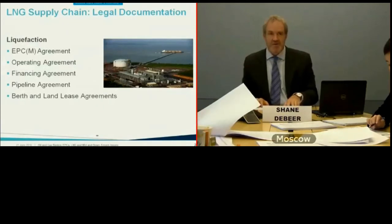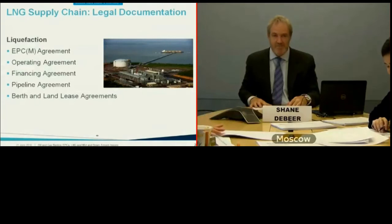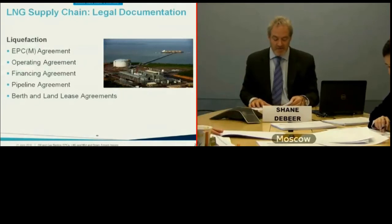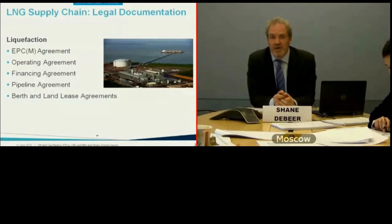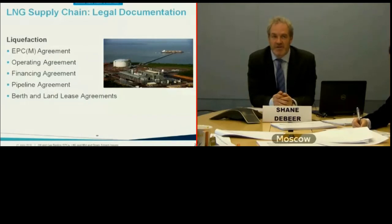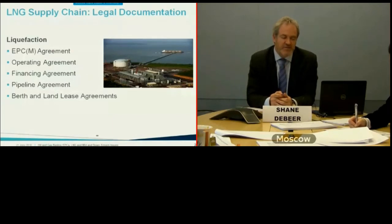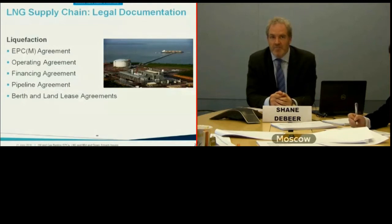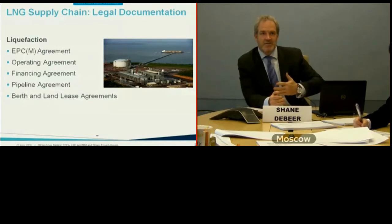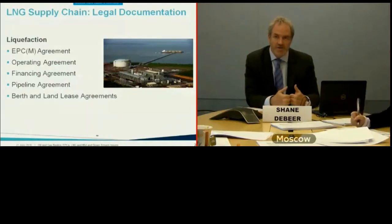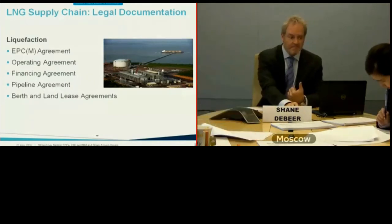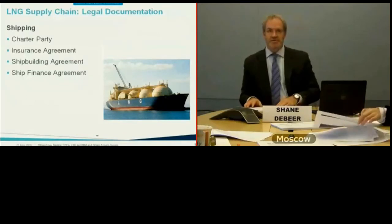For the liquefaction plant, in addition to the EPC contract, there will be an operating agreement with a designated operator — there are specialty companies that operate LNG liquefaction plants — a financing agreement typically in project finance form, a pipeline agreement to move gas from upstream into the liquefaction plant, and berth and land lease agreements for the port infrastructure required to export the gas.